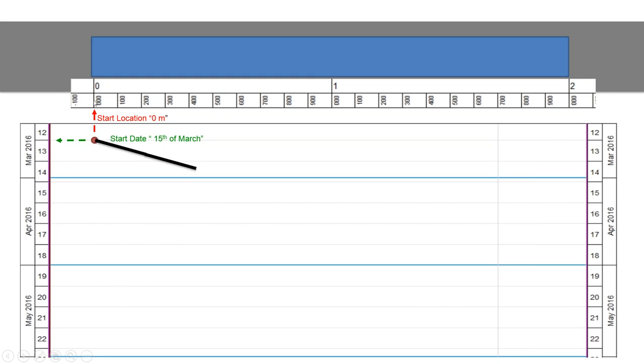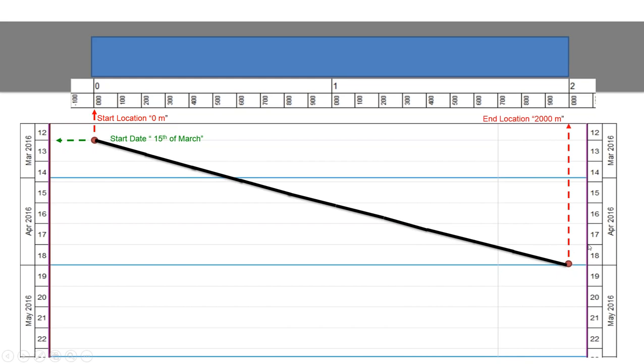I can continue my work after 200s, and you can see that I can just finish my construction work starting from one location till the end of my channel, so that when I come to the end of my activity, when I go up, it represents my end location. If I go to the left, it represents my end date, so this is the 30th of April, and the difference between end date and start date gives me durations, so this is approximately 46 days for construction